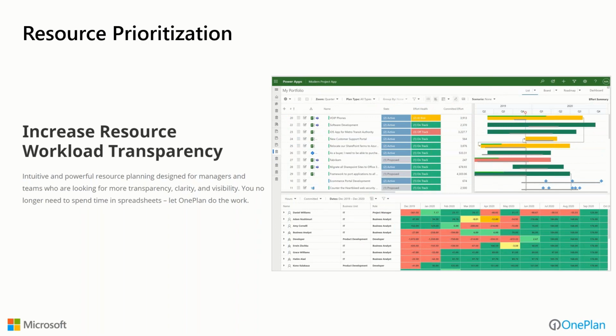Resource prioritization, be able to look at what-if scenarios in here and look at the portfolio that we're proposing to embark upon, and then look at down below what the resource constraints might be and see, do we even have the bandwidth, or are we overcommitting by looking at this portfolio, and looking at things like, should we stagger our projects differently or should we deselect lower priority projects?